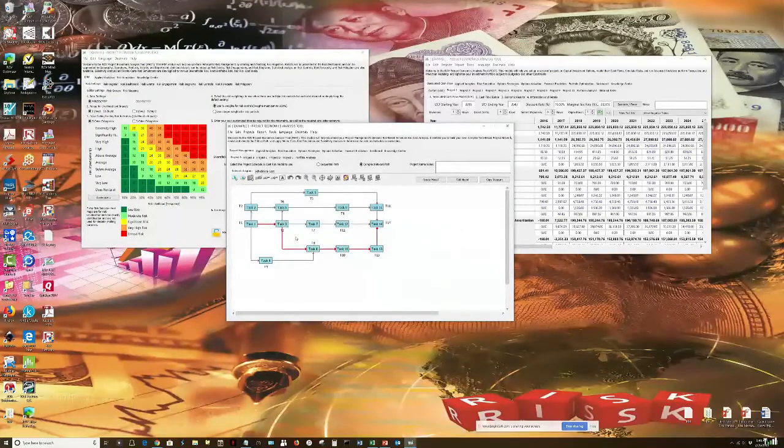Task 2 might take between 2 weeks and 2.5 weeks. Task 9 might take between 9 and 10 weeks. I'm including all possible outcomes, and I'm running all these, and I can determine the probability in totality that it will take me, that it will cost me, and so forth. And it also generates for you this red line that you can see here. That is your critical path.